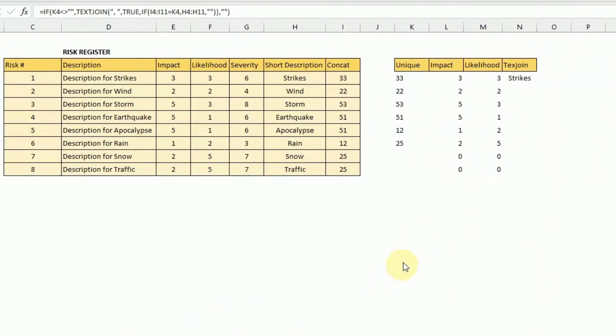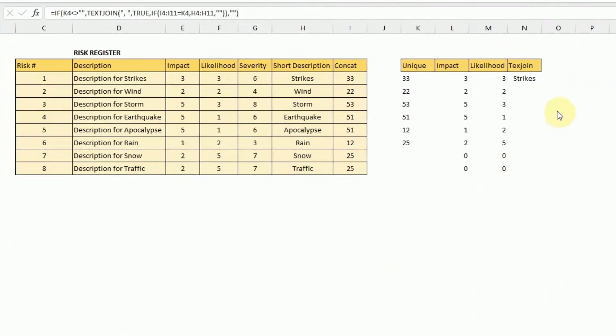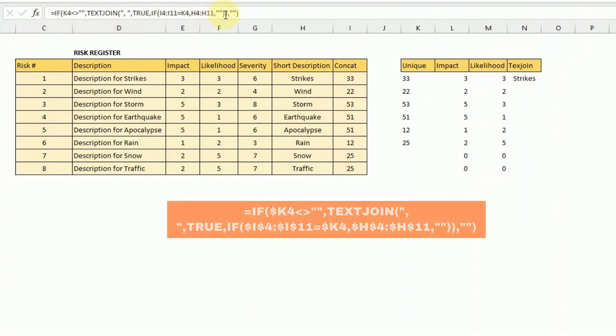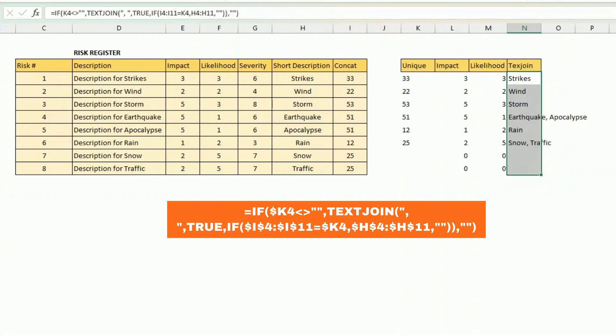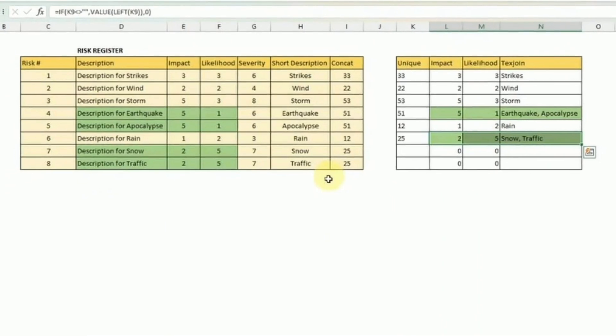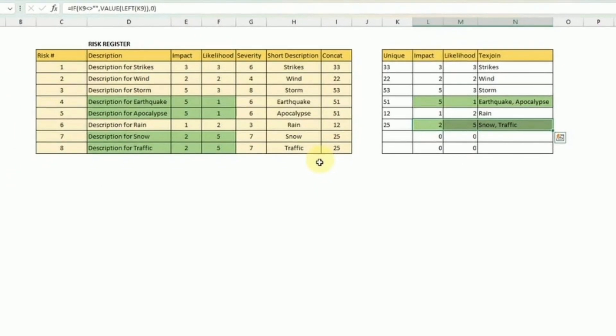So here the last formula, the most complicated formula - I'll have it in the description if you want to copy and paste it. I'm checking that if the unique field is not blank, I'm joining all the descriptions that I find that have the same impact and likelihood combination together. I have two risks that have the impact of five and the likelihood of one, and I have also two risks that have the impact of two and the likelihood of five.